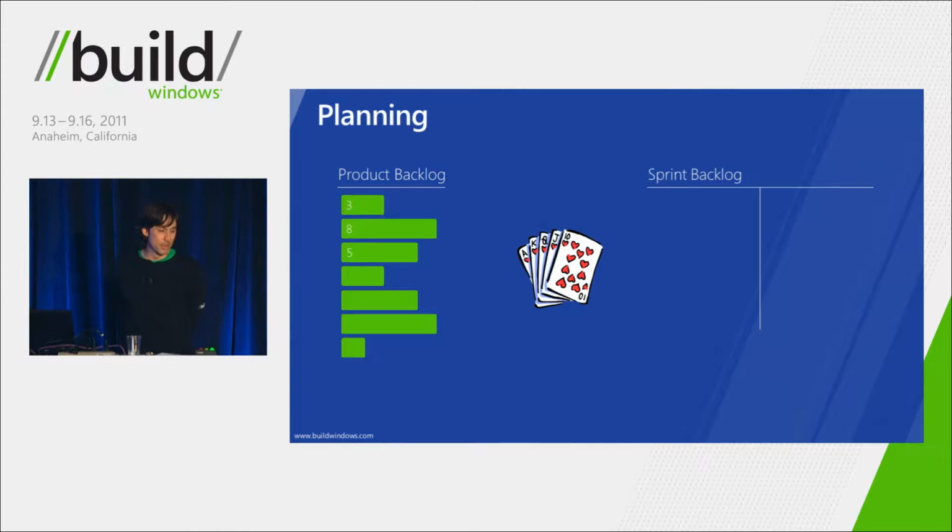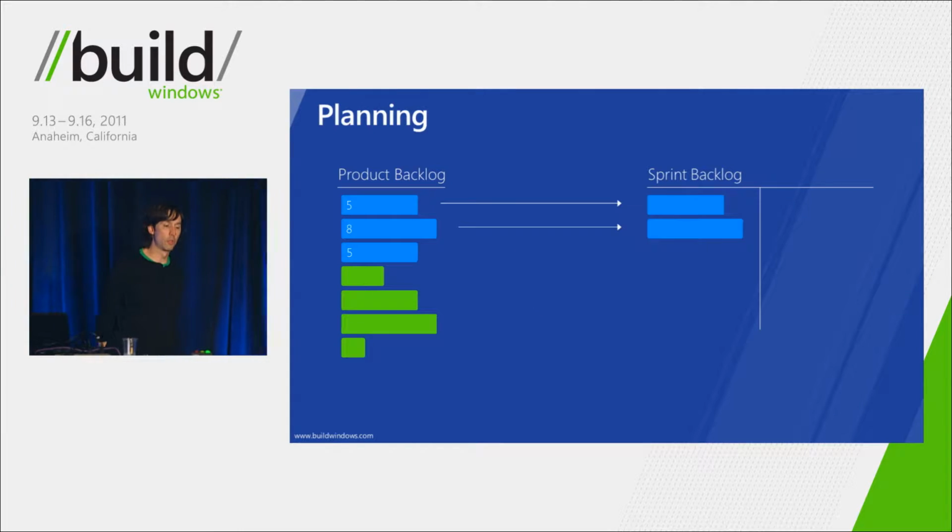All right, so after we play planning poker, we re-estimate. So we see maybe something that's a 3 goes to a 5, right? We reach consensus on that. We're agreeing on scope. We're agreeing on what done looks like. And now we're going to start and pull those items into the sprint. And the team's going to start to decompose them.